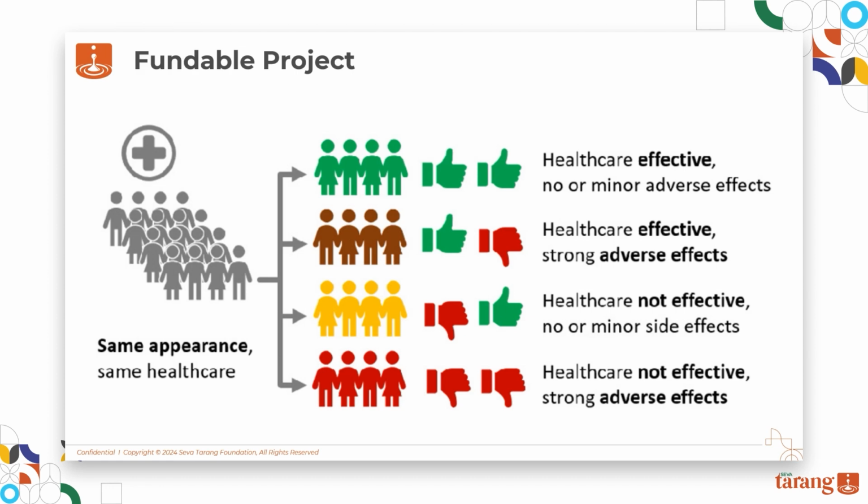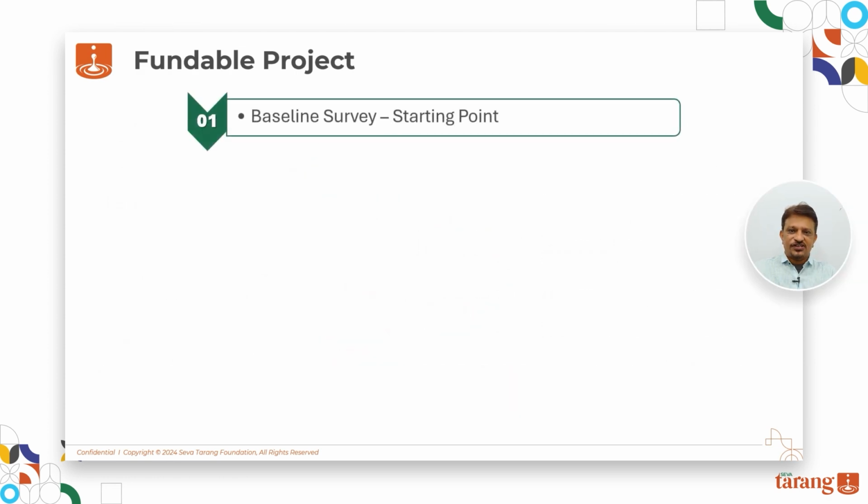The easiest way to do this is putting yourself in the funder's shoes. Put on the hat of the sponsor and think from his or her point of view. Think of all the questions and concerns the approver might have and start writing their answers in a logical order. Take help of the following list of components to make your project proposal as credible as possible. Your starting point should be a baseline survey. A baseline survey is an important activity to determine the before and after situation of a project.